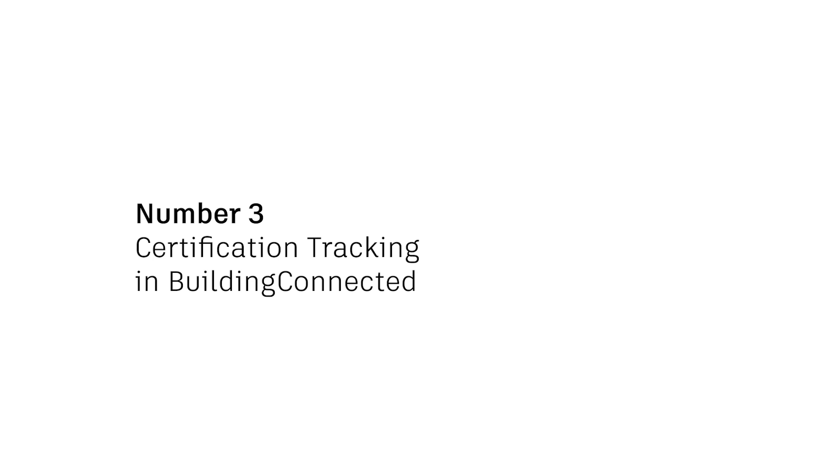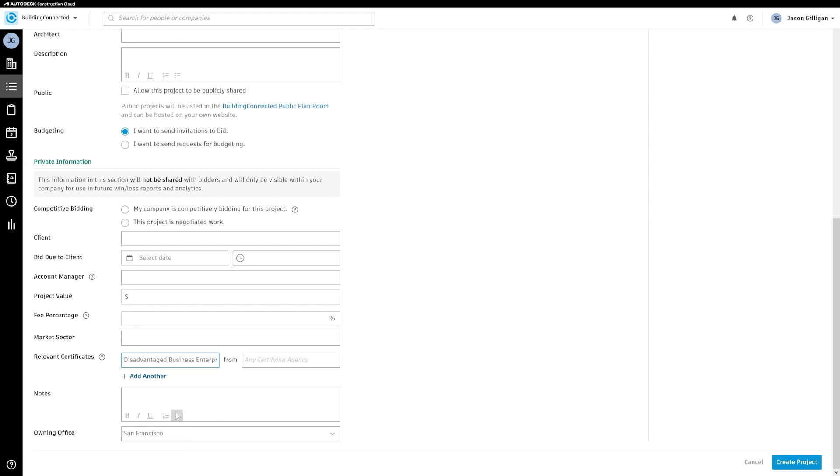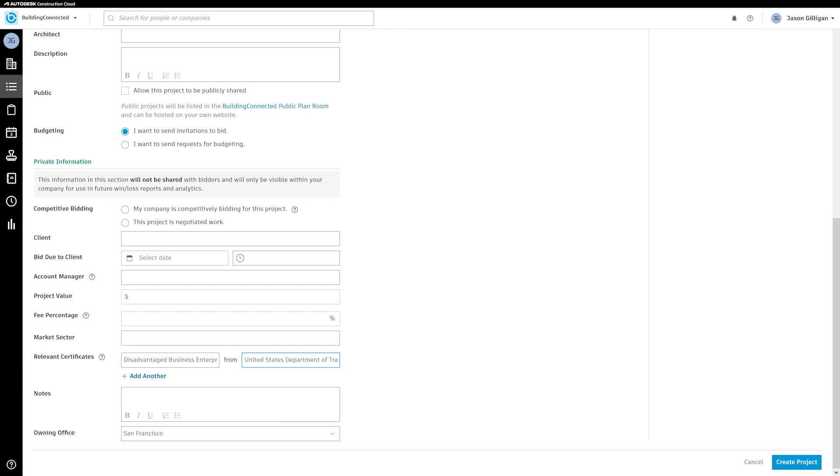Number three, certification tracking and building connected. It's increasingly common for construction projects to have requirements for GCs to work with certified disadvantaged business enterprises such as veteran-owned, minority, local, and more.